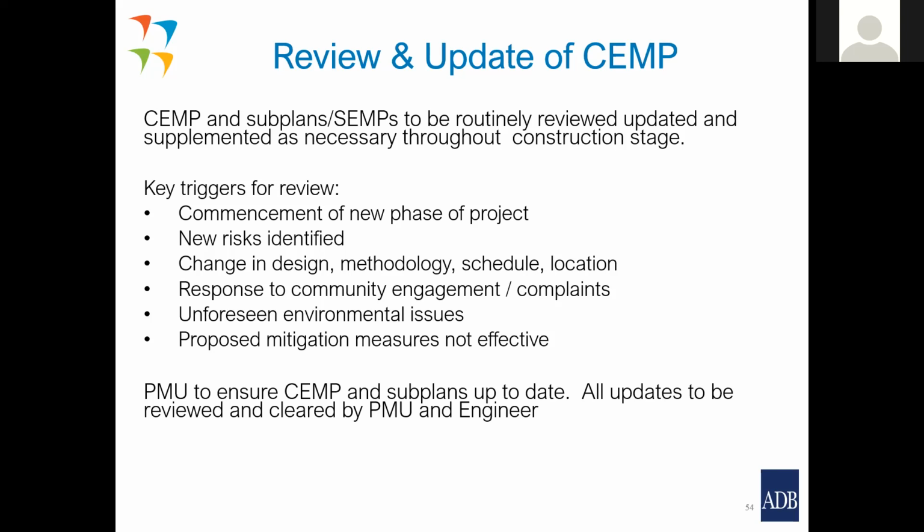Unforeseen environmental issues, for example a cyclone or a major failure. And then finally, a key trigger would be that existing mitigation measures are not effective. So it needs to be reviewed and updated.